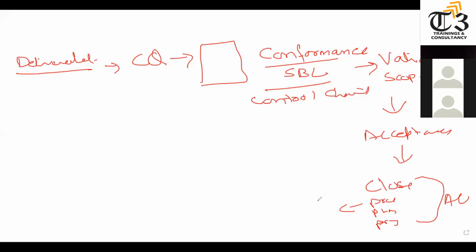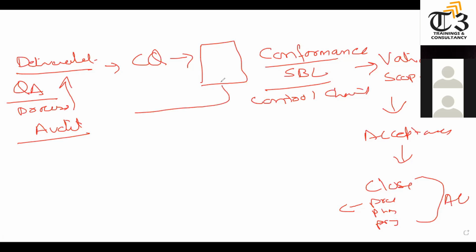Now let's wait a minute. While doing so, control quality means when you are producing the deliverable, the quality assurance guy was there, which is manage quality. They were checking the process, that the process which is required to produce a deliverable is okay or not. For that, they will perform what? Audit. Audit of the deliverables, audit of the documentations, audit of the whole process. First, they will do it on assumptions, but once they get the real data from control quality, then they have the real data. So if there are deviations, they can perform root cause analysis.